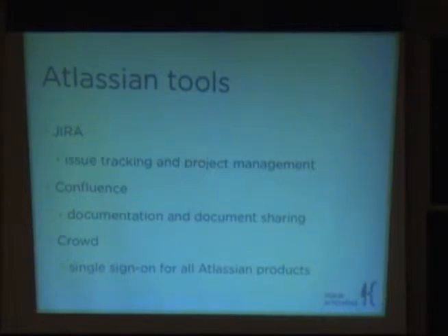It also allows you to set custom fields. So for instance, we added custom fields for like Scrum points, Scrum priority, and things like that. So when we do our planning poker, we just sit around Jira and add in all the points for all of those issues and stories.